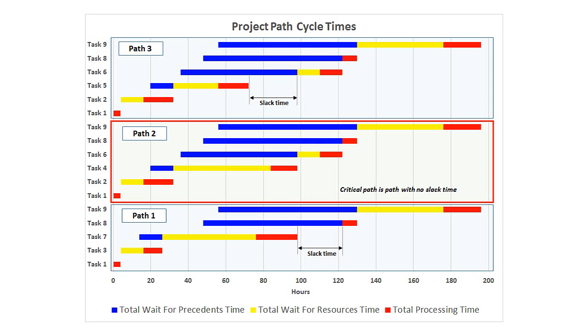Right when task 7, if we move from left to right, which is increasing time, we see that task 7 completes, the red bar terminates, and if we go up vertically, we intersect task 8, and we see that task 8 is in a blue color at that time. Well, this is the result of a simulation run, and this is what happened when we ran the simulation. At that time, at 90 plus hours when task 7 completed, task 8 was in a state that it couldn't really start because it was waiting for precedence that you don't see on this particular path.